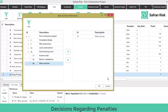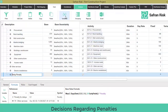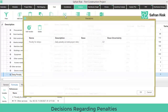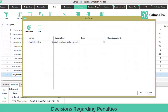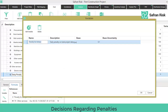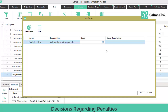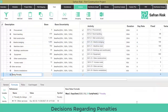Second, we need to create a variable that holds the penalty amount. Go to the Variables Creation icon and add a name: Penalty for Delays. A description: Daily penalty on total project delay. And a base of 0.1, meaning $100,000, since the project has been estimated in millions of dollars. Close OK to finish creating this variable.